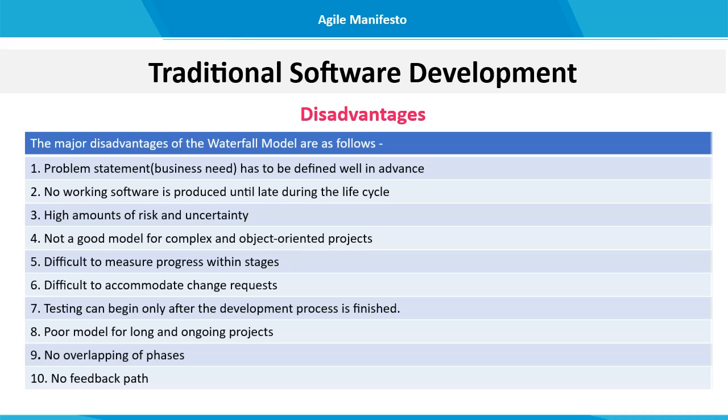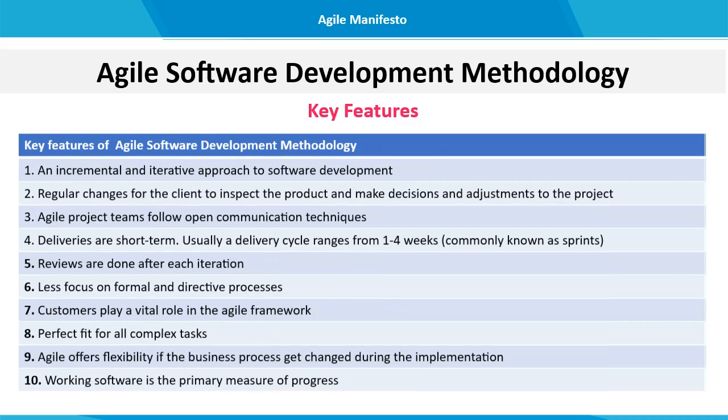Testing can begin only after the development process is finished. It is a poor model for long and ongoing projects. There is no overlapping of phases, that is, two phases cannot be executed in parallel. No feedback path is available in this approach.